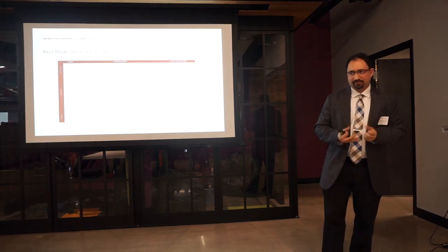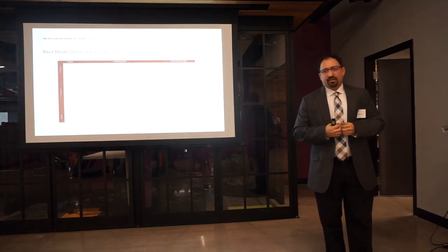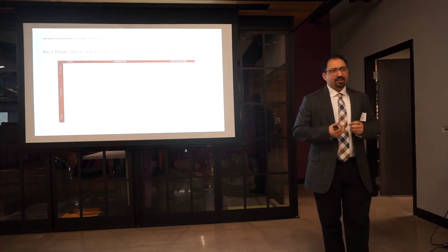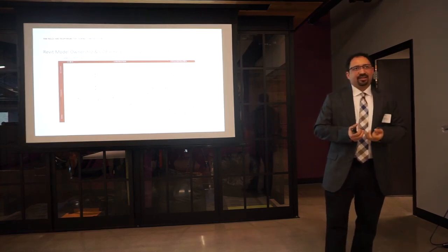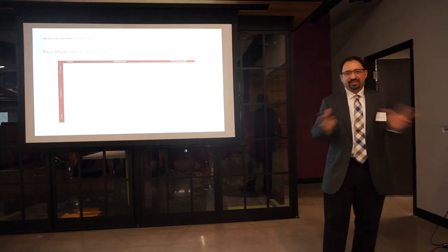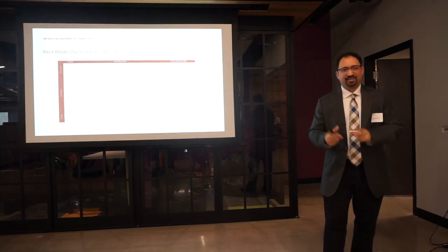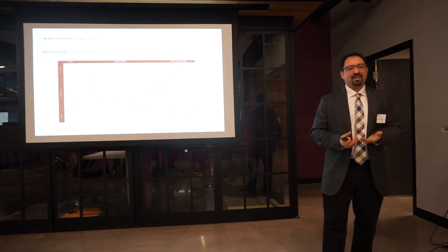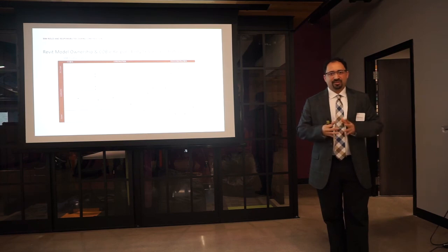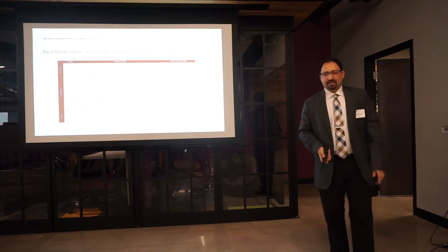And the reason we wanted to keep the responsibility on the construction management team was because of a bit of liability, in the sense that if they're inserting all this information into the project, and one of our drafters deletes an item, puts it back in somewhere else, and we lost that information. So we wanted to keep it in one location, so there's no fighting on who did what in the project.